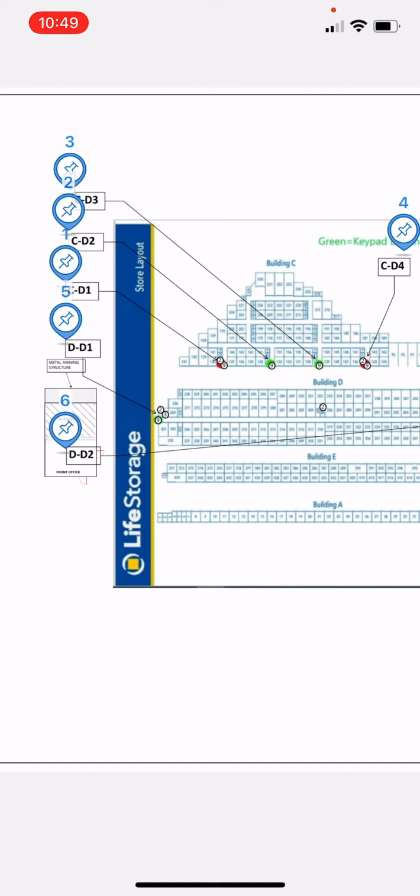Punch list items can be confusing terminology, because typically punch list items are given to us by a general contractor or something of that sort. We are proactive, so we make our own punch lists and be sure that we're holding ourselves accountable, rather than a general contractor or a client having to go out and look at our work and pick out all the little things that we have not finished yet. So we take the initiative, we go ahead of them, and we find everything that we need to complete still.